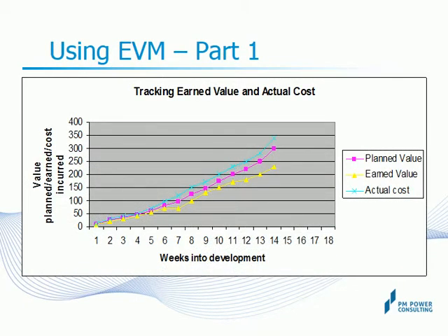A couple of slides back, we talked about applying EVM in the context of activities assigned to a single developer. You can extend that and apply EVM to all activities in the project for a period of time. Refer to the diagram shown in the slide. The first step in doing that is to establish the planned progression of the work in the project from start to finish. This is the cumulative PV for the project over a time scale, shown as a purple line in the diagram.